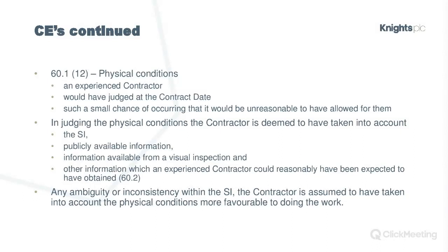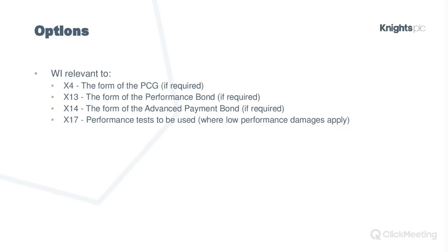So it's quite nicely worded, I think, to allow the contractor or subcontractor to be quite persuasive in showing that it's entitled to the compensation event. Again, we've got the same ambiguity provision. If there's an ambiguity, you assume the contractor's priced the lowest cost item. So if you have to go with the higher cost item, that's covered in the compensation event. But beware again of that Z clause that's often included that we've referred to already.